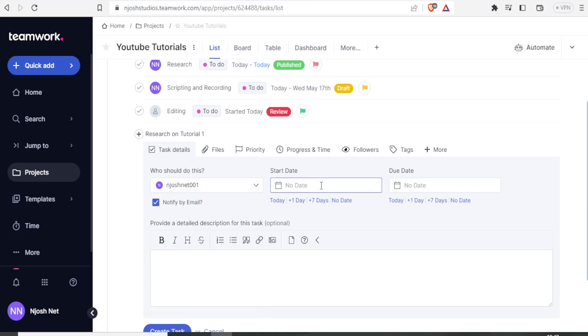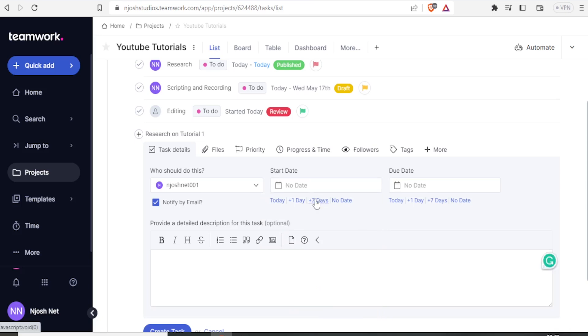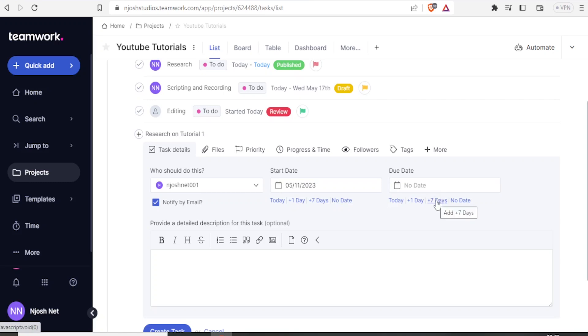Then, here, we can select the Start Date. So it's possible to just decide it starts in a day or in seven days. In this case, let me select it starts in one day time. And I can also decide it ends in seven days time. That is the start date and the due date.